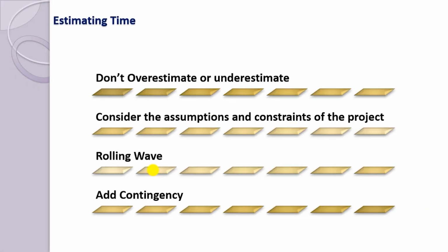Estimation is an art, and when we talk about estimation, it's very important for project managers, to become expert project managers, that we tell our client clearly that an estimate over a longer time, like 8 weeks, 9 weeks, won't be accurate. Sometimes the client wants it for the approval of a budget from the user department, but mostly it is better to mention to the client that an estimate of more than 3 or 4 months at a very detailed level is not practical, because requirements keep changing. So it's very important to understand this.